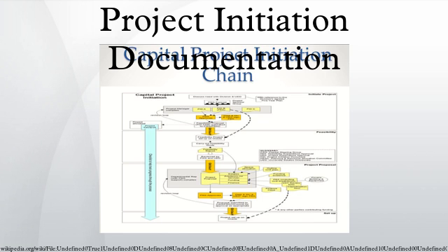In a situation when stakeholders decide to move the project into exception, a detailed exception plan needs to be introduced, which will replace the versions of the project stage plans that were in use before the exception. And on top of all this additional paperwork, the project manager will also have to keep the project moving forward and ensure their team are motivated.